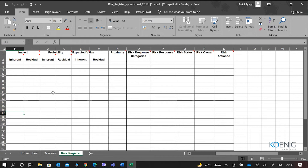Proximity is about how soon a risk can happen. For example, if I'm doing a one-year-long project, there can be risks in the first quarter, second quarter, third quarter, or fourth quarter. So when we expect a particular risk to happen is what is defined based on proximity.